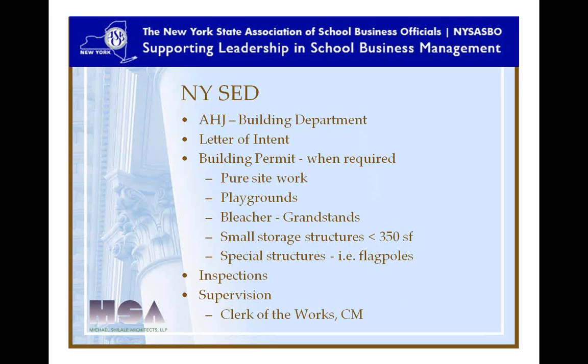SED is sometimes a difficult group to work with. As building departments go, they have the longest turnaround time for building permits. We do work in New York City as well, which is a difficult place to do work, and we can get permits there sometimes much quicker even than we can out of New York State SED. I think the present waiting time is about 12 to 16 weeks for a building permit, so you really need to budget that into your schedule. And the quality of the documentation submitted to SED will affect the time frame of your review process.